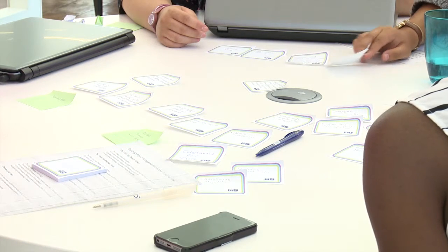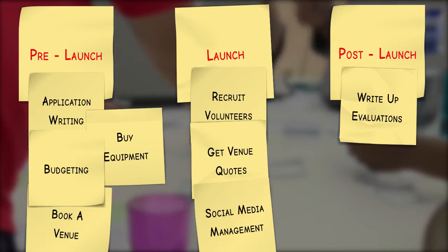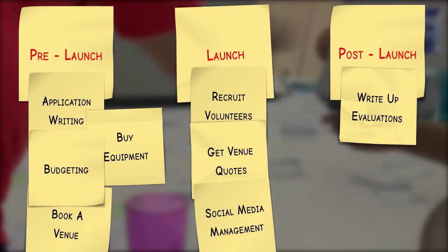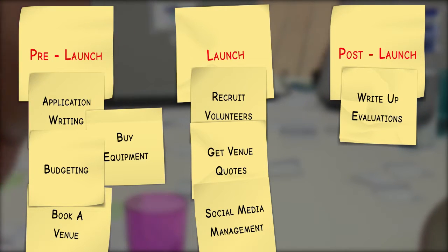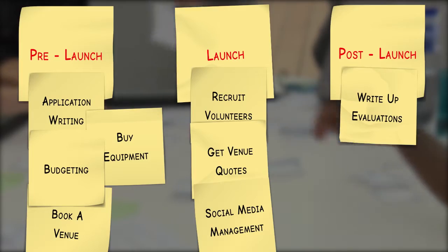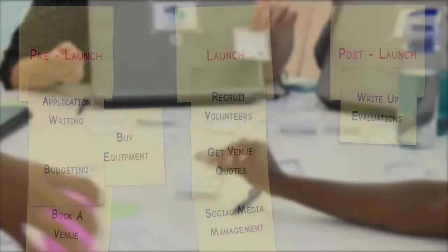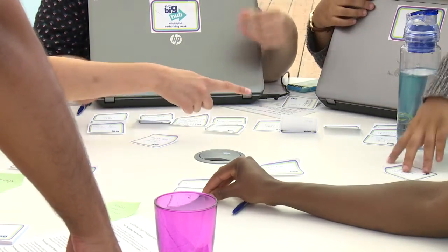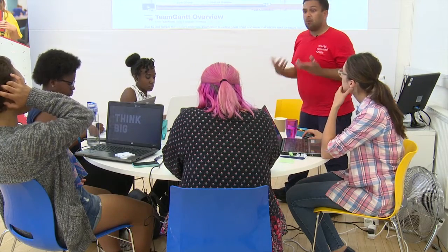Make sure that you order your tasks too. You need to make sure that you've got your design posters task before your put up posters in community centres task. Take 5 minutes to split your tasks into categories and order them. Congratulations, you've now got a project plan. Now let's have a look at some programs which you can use to manage your and your team's time.